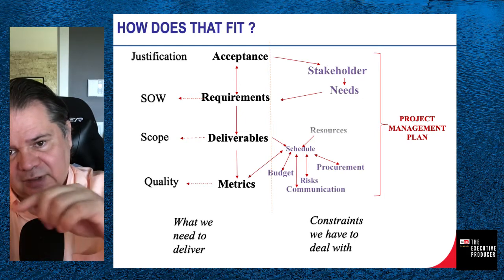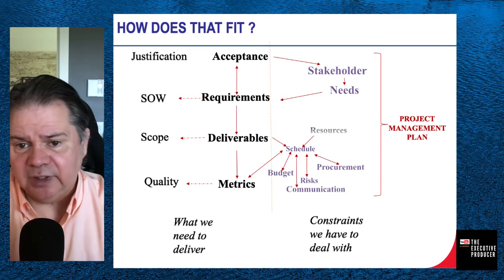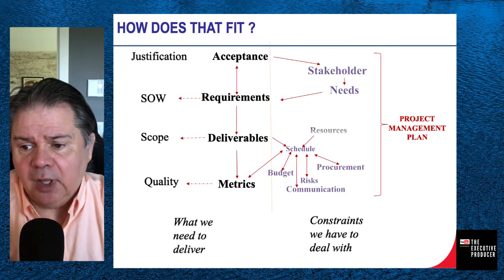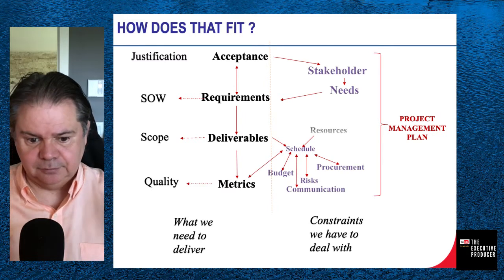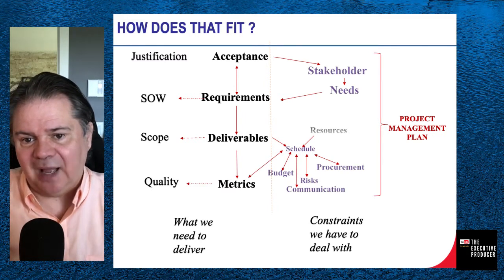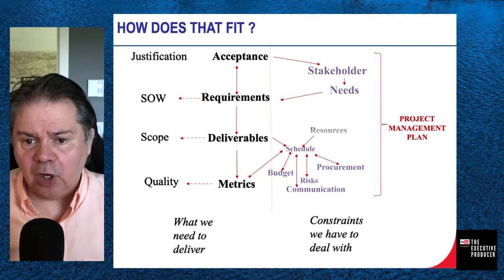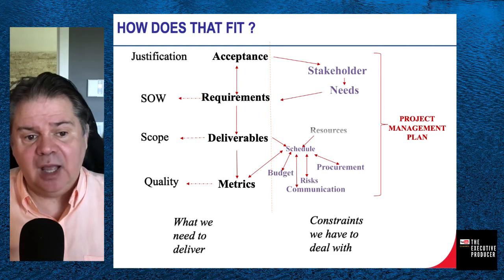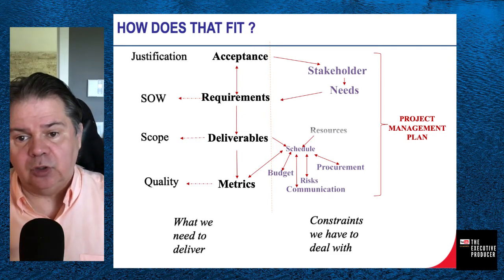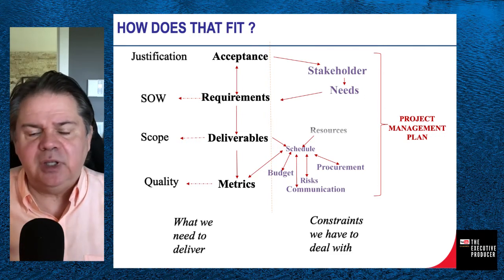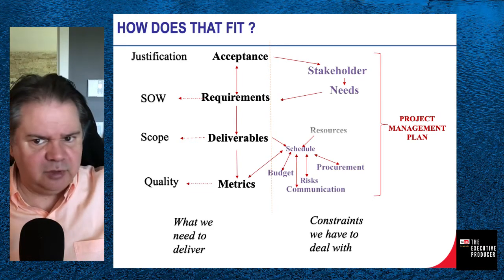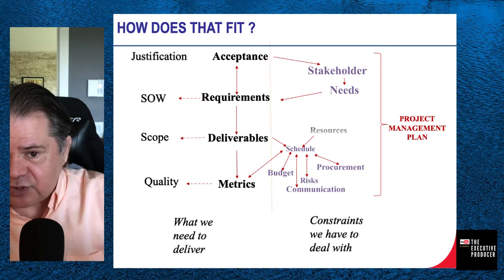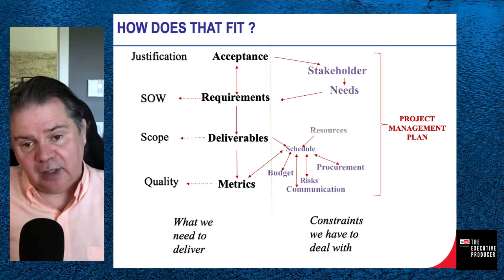The budget will be time-phased with cumulative costs, as you go in an S-curve, and it will be used for dealing with the boundary on costs that we have for this investment. With the budget and the schedule, so far it seems to be a pretty straightforward process, right? We started with the requirements, went to deliverables, to schedule, allocated resources, and got a budget.